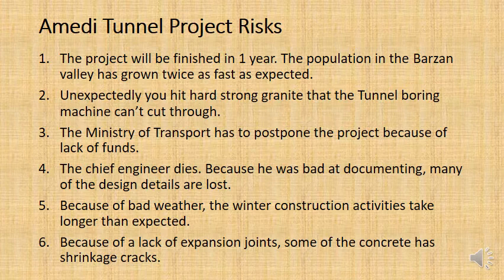Number 6, because of a lack of expansion joints, you know about expansion joints because you did building materials. Expansion or contraction joints is another name for them. Some of the concrete in the lining of the tunnel starts shrinking as it goes hard, and cracks emerge in the concrete. So that's going to affect the quality.